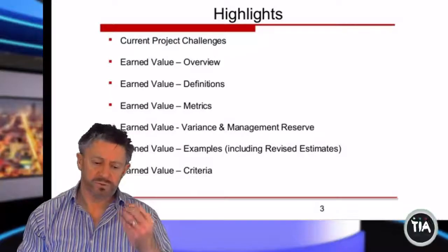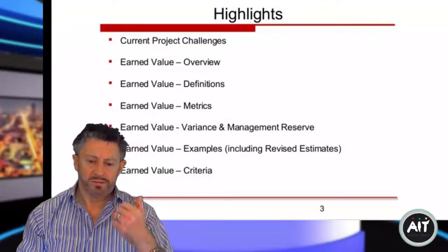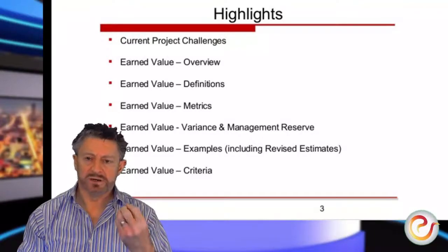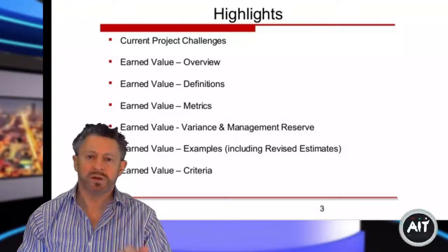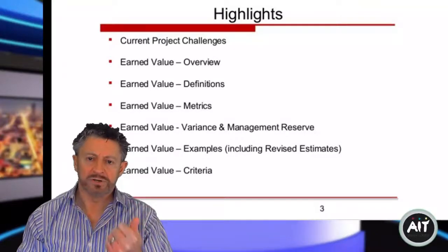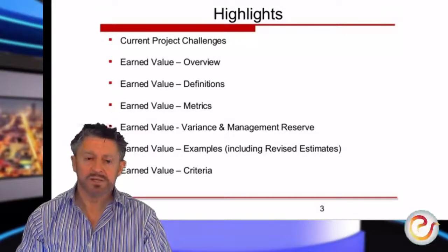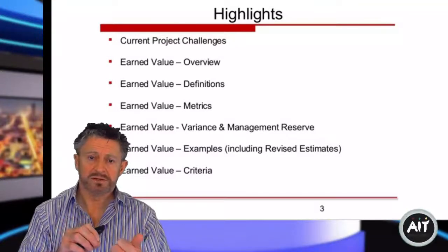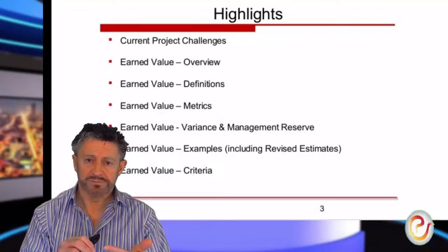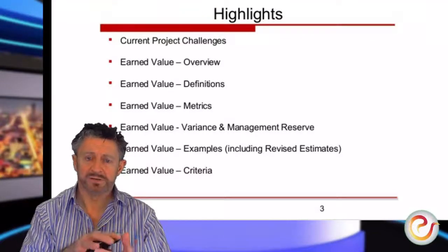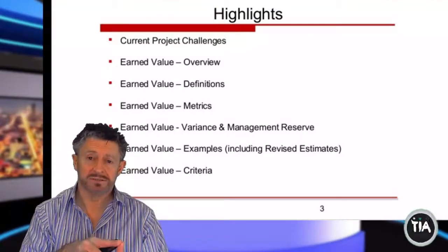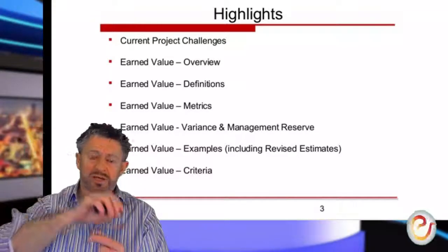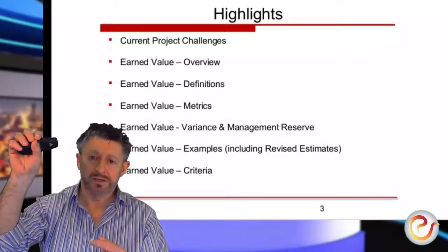When you go through all the project detail, all the activities, you've assigned people, you know how many hours each activity takes, and the hours multiplied by an hourly rate, the man-hour cost, gives you the budgeted or planned cost. So you have the planned cost and the planned hours of the project. They're the two basic pieces of data. As you accumulate those, you have an accumulated budget and an accumulated time.